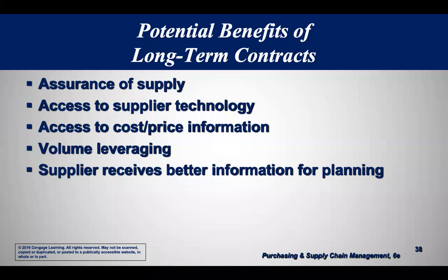Generally speaking, you'll be able to agree to lower prices because you've agreed to a longer term, which would generally mean more volume leveraging. I'm not going to buy only 20 desks, I'm going to buy 500 desks, and you should get a better price so long as you're prepared to commit. And of course, the desk person now knows they can plan better. If they're planning for their desk factory, they know they've got an order from you over the next 5 years for 500 desks, so they can do better planning.